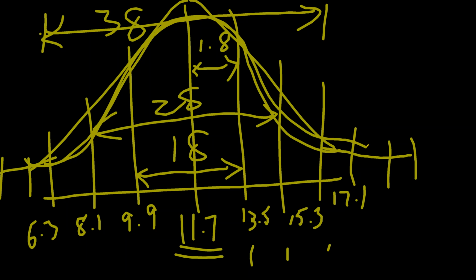Now, after having run that, it will give you the result in a very beautiful way. It will show you this kind of a graph which I have just made. It will show you that the optimum chances of completing this project is in this many days. Say 11.7, maybe that figure is going to be even better than this, because my figure is calculated manually, and it is not calculated based on hundreds of rotations of simulation. So my figure is very bad. So that could be, say, 15, and the standard deviation size would also be different there, and that is the most authentic data. Now it tells you that you have a high probability, or say maybe 100% probability, of completing this project in 15 days.